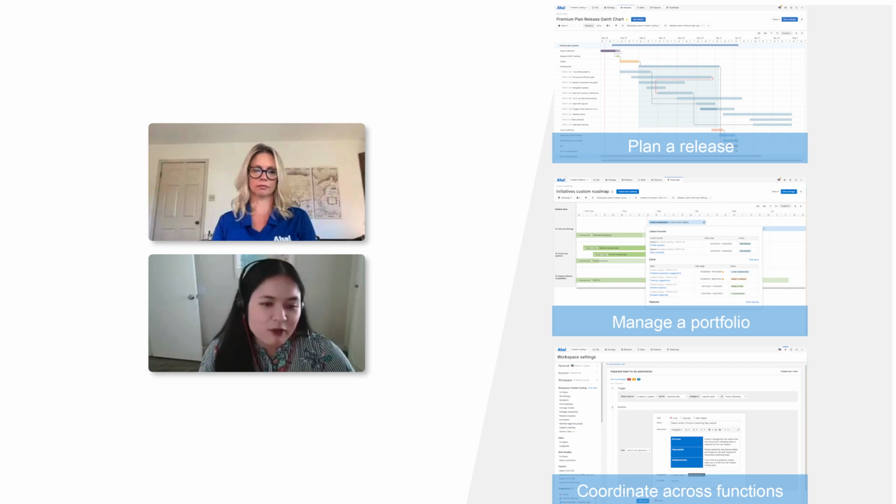So for example, our customer success team cannot update demo environments until a feature is live and they understand the new functionality. And our product marketing team cannot start drafting the blogs or the knowledge base articles until product management has written positioning. And so with so many of these interdependent tasks, the plans can easily fall apart without proper tracking. But thankfully, we have an established process that provides visibility into the different dependencies and statuses of each item so that if needed, we can adjust our plans.